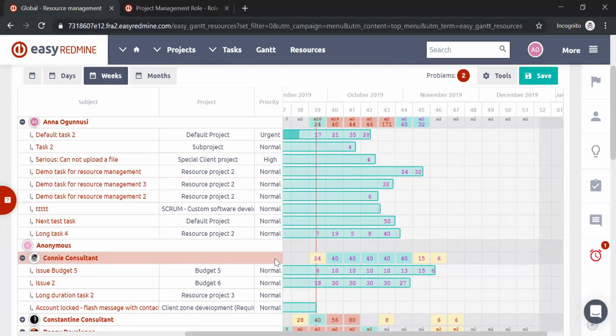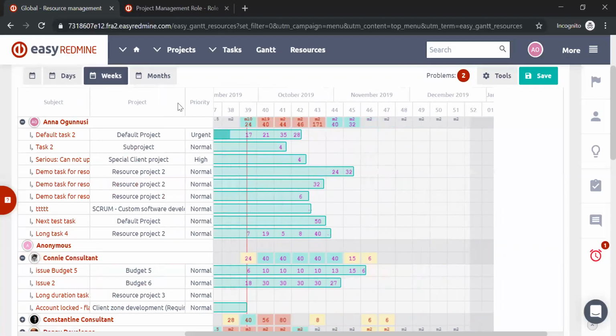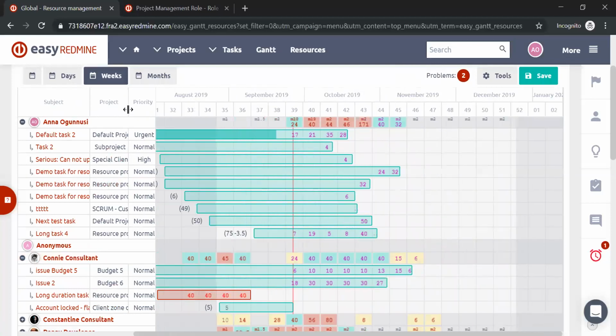And if the priority column is not displayed, if you are not taking priority into notice, if that's not your main attribute, then the tasks are balanced according to their order. So it's very important, if you work with the attribute of priority on the tasks, to make sure that the column is visible, that it's active on your resource management, so the balance feature can take it into notice while balancing it out.